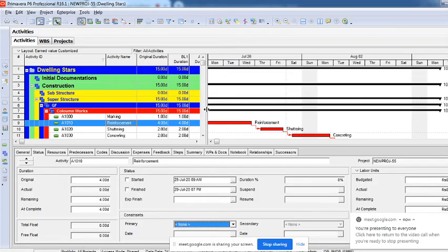There are 3 again codes. Coding is usually basically for sorting. Whenever you need something to be sorted, you go to the code, and based upon some particular code we start sorting the things. Similarly, codes can be created for various categories: activity code, project code. The codes can be created for resources as well. So you can sort your activities, your projects, and your resources with respect to some code.